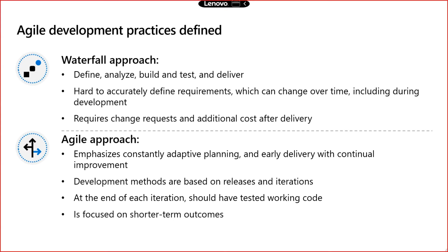So what we have to do now is move to DevOps, and DevOps and Agile need to work together. What is the benefit when we go with DevOps? We look at something called adaptive planning. If new changes are coming, we can't say no to them. Being agile, being DevOps, we need to accept those changes, put them into the backlog, and prioritize them later. If I don't have the bandwidth now, I can put them in the next sprint and design them then.